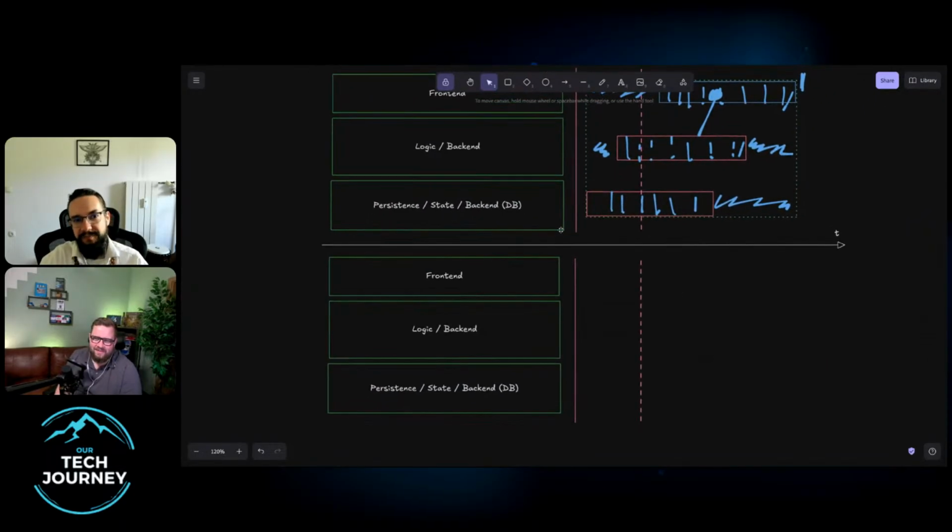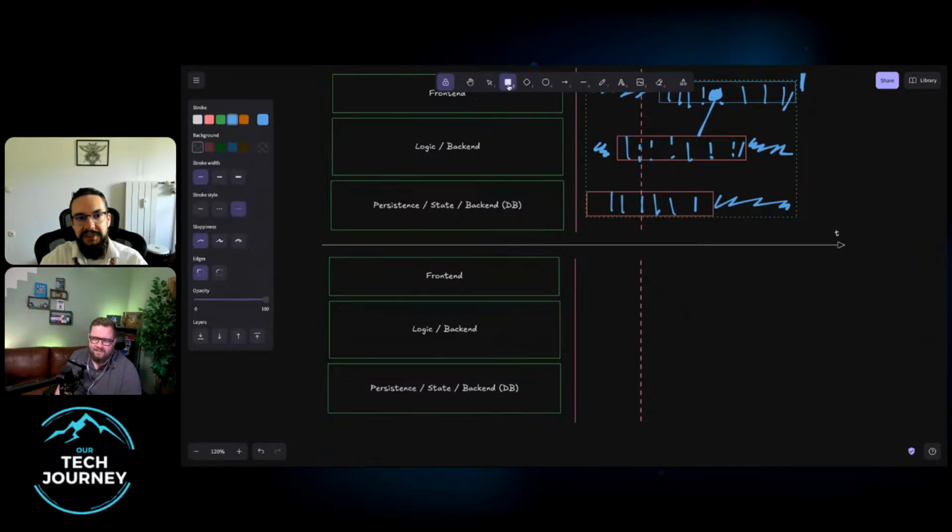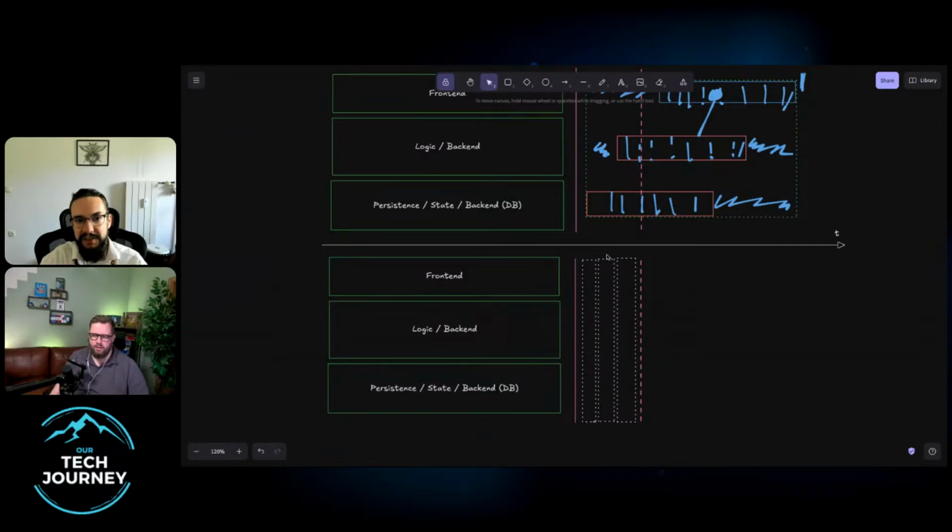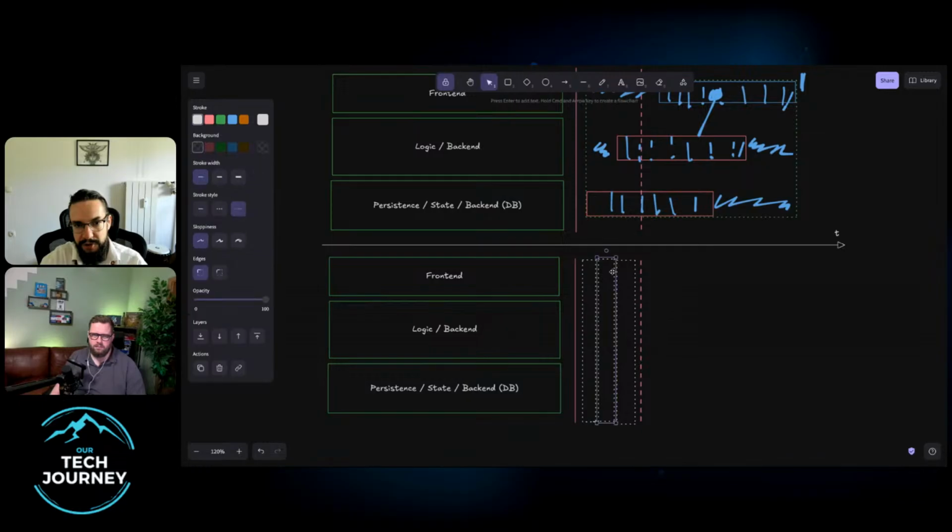Right. So, what vertical slicing is, the layers still exist, but we as a team constrain ourselves to what kind of batch can we create, what kind of increment can we create that fits into a timeline where we can guarantee that all of us are moving forward at the same pace before the requirements change.